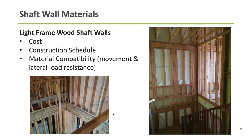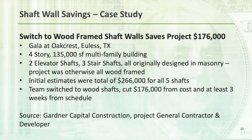Why would you consider doing wood frame shaft walls? If the rest of the building is framed with wood, the reasons are probably the same: material cost — you can find material cost efficiencies when the code allows it; construction schedule — keeping it all to the same framing crew as opposed to bringing in a separate framing crew just to form up the shaft enclosure walls; and material compatibility — things like differences in material movement, lateral force resisting systems, and compatibility issues.